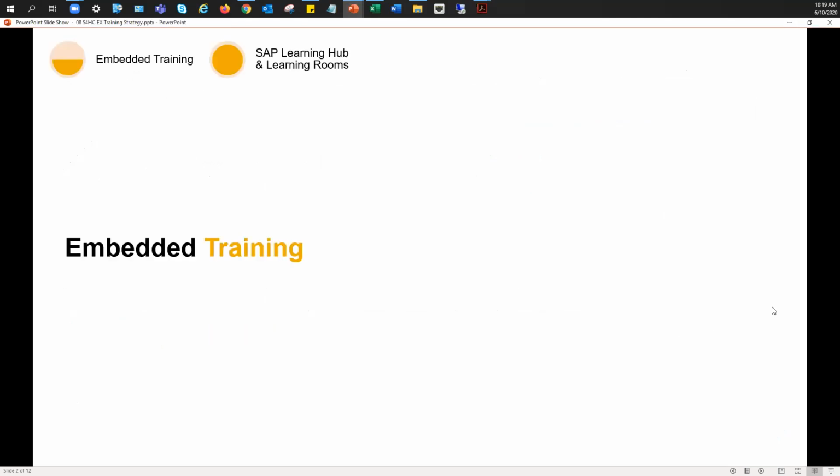From a training strategy perspective, obviously this is a lot more detailed than what I'll show you today. So assuming that you've actually had a group related to the organizational change management team that has defined the training strategy, part of that is doing change impact analyses for every single Fit to Standard workshop. So in a perfect world, you'd actually have someone from the OCM or change management team participating in each Fit to Standard workshop. And every time you finish discussing one scope item or business process, they go, okay, let me just check in. Is this a major change to what you're doing now?